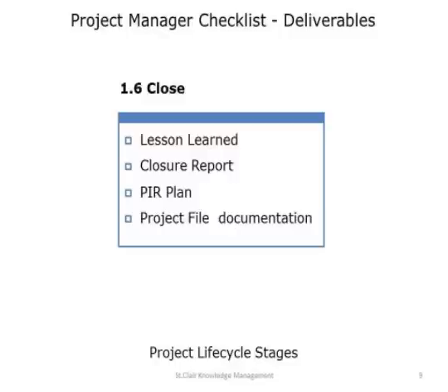Your closure report is the main document that you produce and which needs to be signed off by the project board. So in there, you're looking at final costs. You're describing the project in terms of what was delivered, what wasn't delivered, what was the cost, whether the project came in on time. So it's basically things like that.